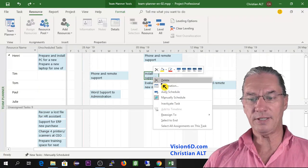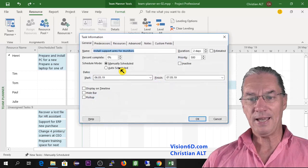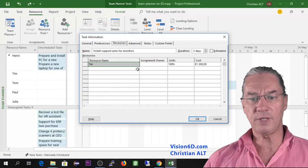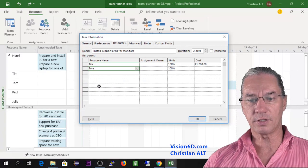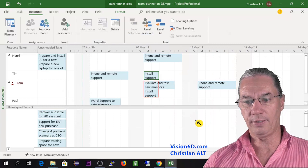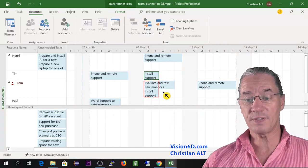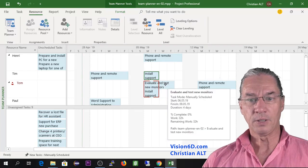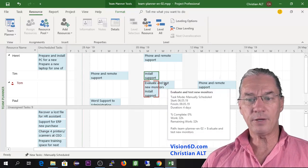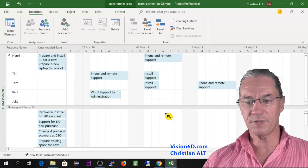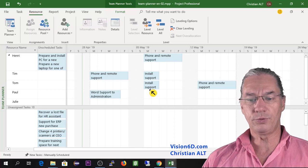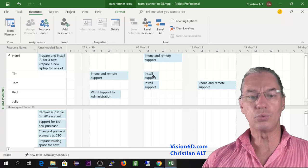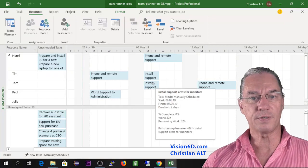I go into the task information, and among the resources you can see Tim was assigned. I also add Tom here. Now we have a conflict — an overallocation. So I'll schedule this a bit to the side for the moment, removing the overallocation by having the two of them perform this task the following week.